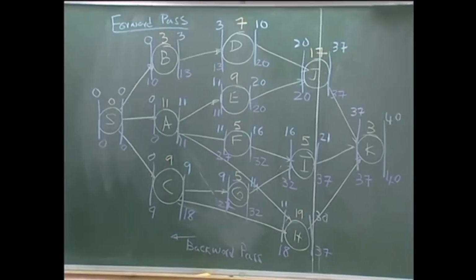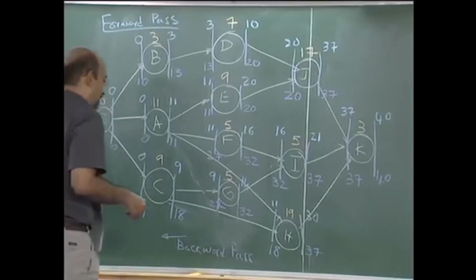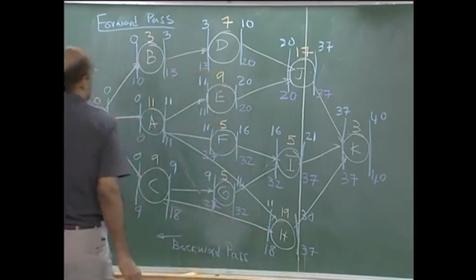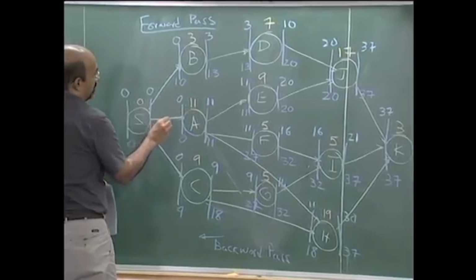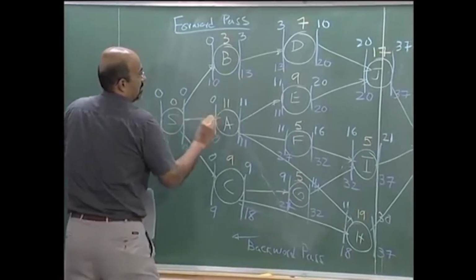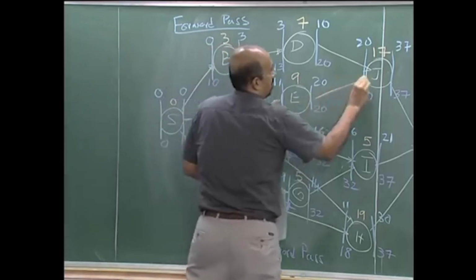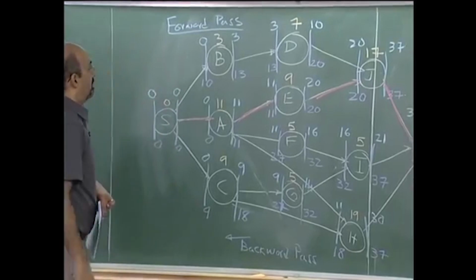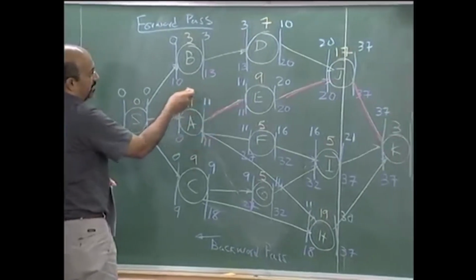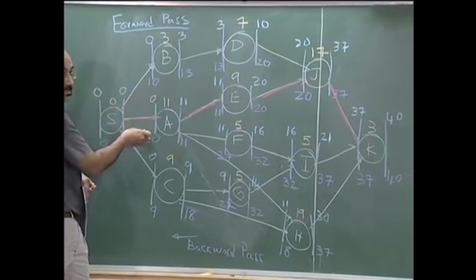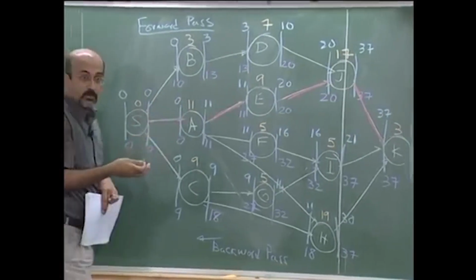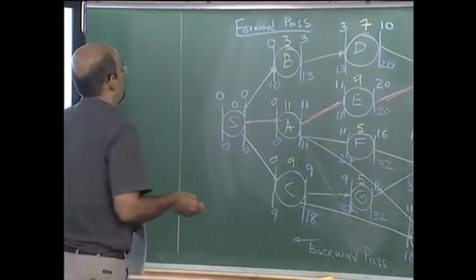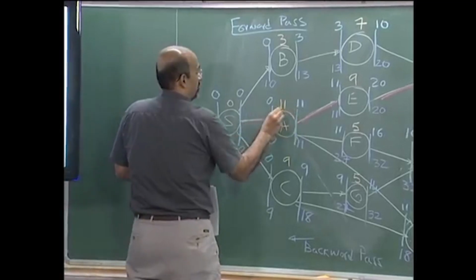And so now when we look for the critical path, we have to identify the activities. We can make this network like this, it is quite simple. We can see that it goes to A, E, J and K. Okay, and we know from the analysis that if my early start and late start are the same, then that would be the algorithmic way of finding the critical activity. And so all of these activities are critical.